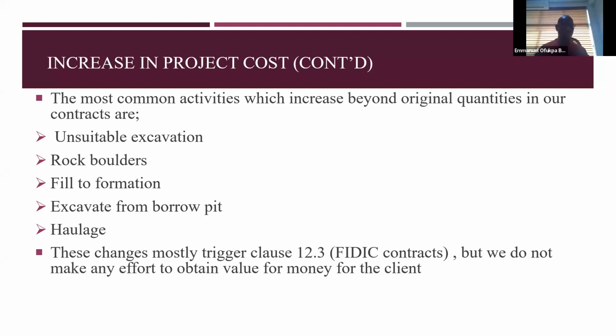But we feel this clause will give us opportunity to renegotiate those rates, because it's supposed to be a clause that when certain conditions are met, like in terms of quantity and in terms of change, then you'll be able to renegotiate the rates accordingly. But a lot of the time, we think that this clause is meant for the contractor. It's meant for both contractor and client. So when the client also feels that he's not getting value for money for that activity, he can also put in a request for rate negotiation as a result of the increase in volumes.